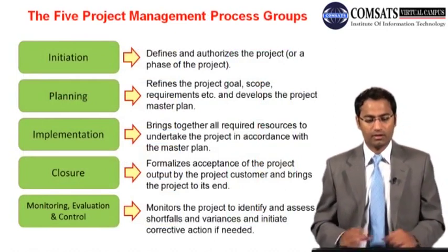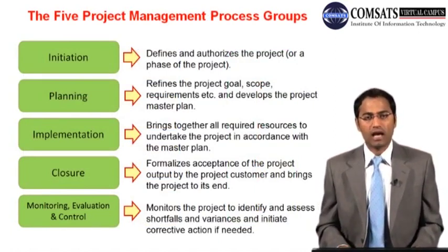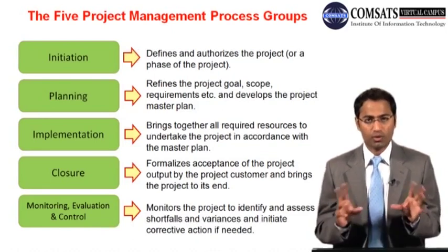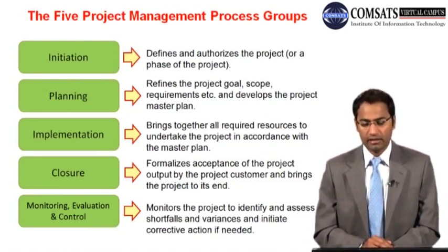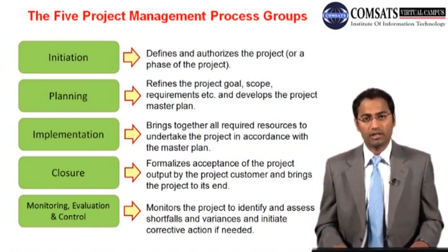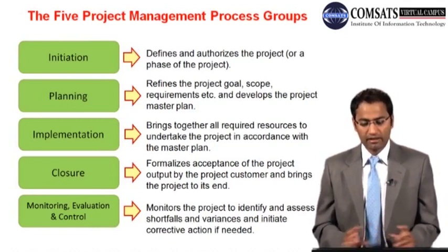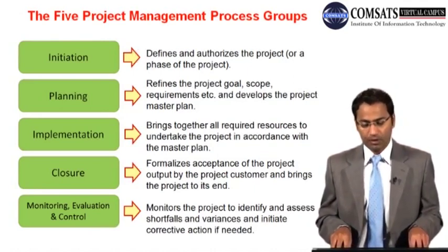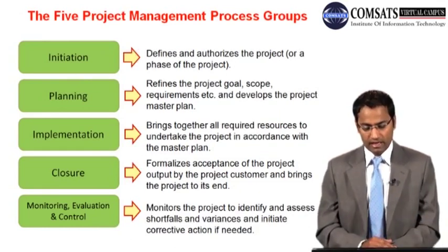And this slide is already shown to you. Initiation defines and authorizes the project manager and project team to utilize company resources. Planning refines the project goals and scope. We are going to talk in detail in the relevant section of this presentation. Requirements are refined and the project master plan is developed. Risks are defined, the project team is defined, WBS is created, the project management plan is developed. Implementation brings together all required resources to undertake the project in accordance with the master plan. Closure formalizes acceptance of the project output by the project customer and brings the project to its end. And then monitoring and control monitors the project to identify and assess shortfalls and variances and initiate corrective actions if needed.